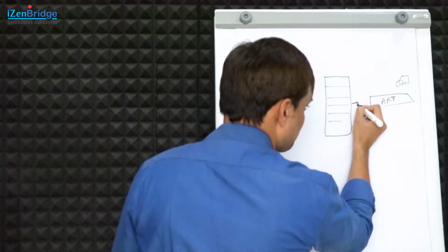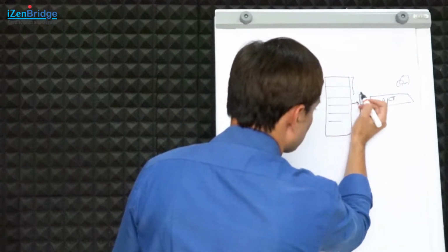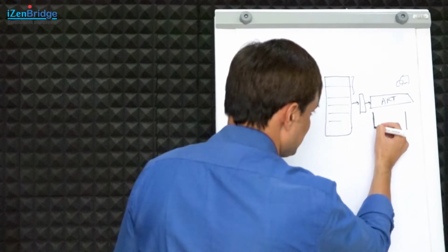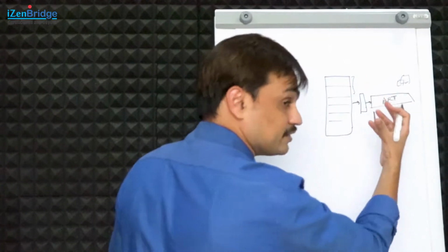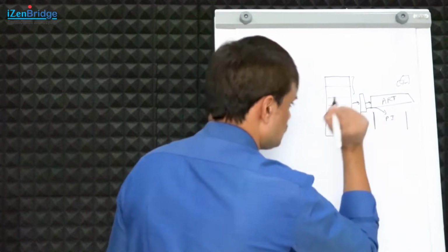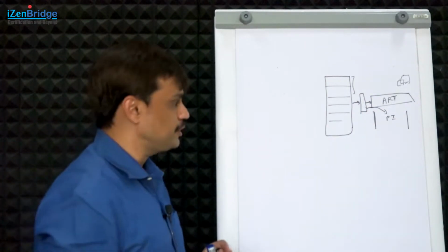They usually do a PI planning meeting here to find out which portion of the program backlog they are going to do in a particular PI. So you can say the PI planning, done jointly by the whole agile release train, identifies which particular items are going in a particular PI. So let's focus on the program backlog more in this particular video.